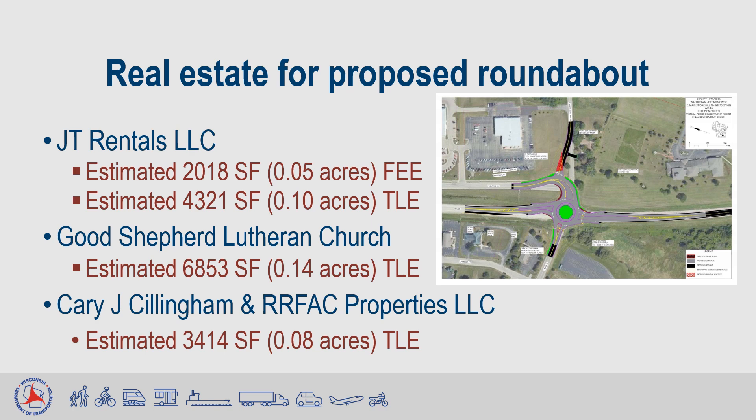Right-of-way will need to be purchased with this project. The permanent fee required is only in the northeast quadrant of the roundabout for the reconstruction of the intersection of Oak Hill Drive and the Frontage Road. 2,018 square feet or approximately 0.05 acres of permanent right-of-way will be required. 4,321 square feet or approximately 0.1 acres of temporary easement will be needed for grading purposes. In the southwest quadrant of the roundabout, 6,853 square feet or approximately 0.14 acres of temporary easement are needed.